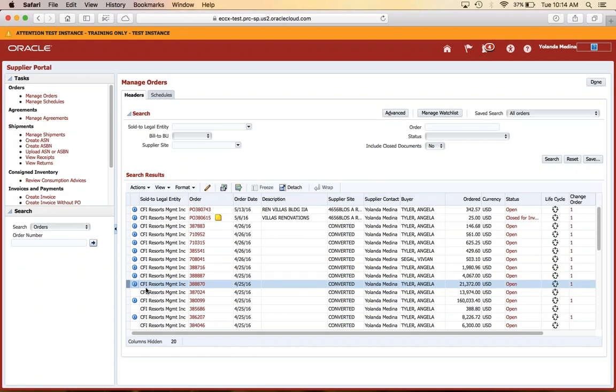If the change order is approved, the process moves along and you continue on with processing the order on your end. If the change order is rejected, then a dialogue needs to be opened between the vendor and the buyer to determine the course of action to resolve that issue.